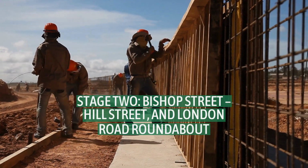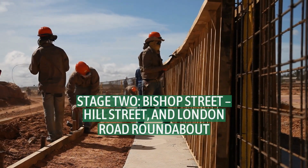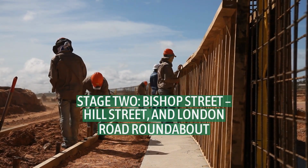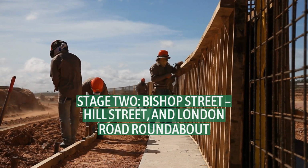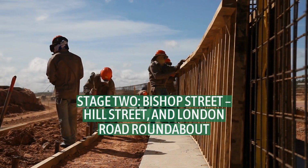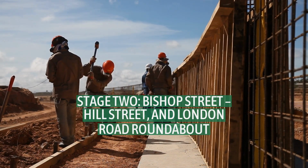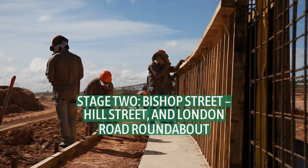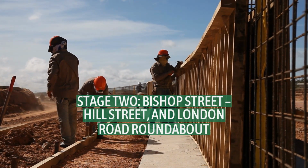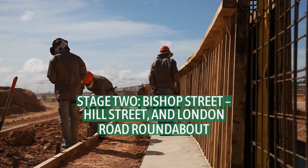Stage 2 also included the separate roundabout project at the eastern end of the stretch constructed in Stage 1, at the junction with London Road, Gulson Road, Whitefriars Street and Paradise Street. To facilitate the construction of the roundabout, the council issued compulsory purchase orders on buildings owned by various shops and businesses close to the site. Two of these businesses, a petrol station and a scrap metal merchant, objected to the purchase and an inquiry was held. The council argued that the petrol station was too close to the road and that it would be difficult to secure access routes from the new layout.